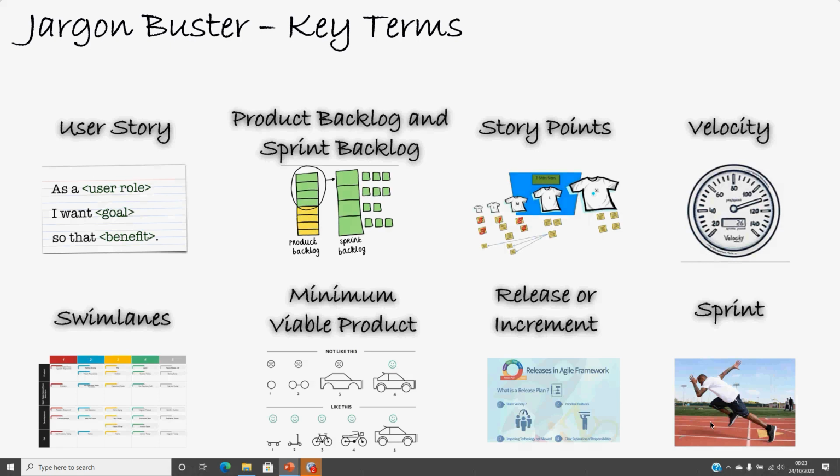Generally, sprints are 2 weeks, but it's not set in stone. It's just a recommendation. The sprint can take up to 3 or 4 weeks or more, but the recommendation is to keep it not less than 2 weeks. You can go beyond 2 weeks, but don't go overboard. Don't make your sprint overly lengthy, because it will kill the purpose. So keep your sprint somewhere between 2 to 3 to 4 weeks, and that's it.